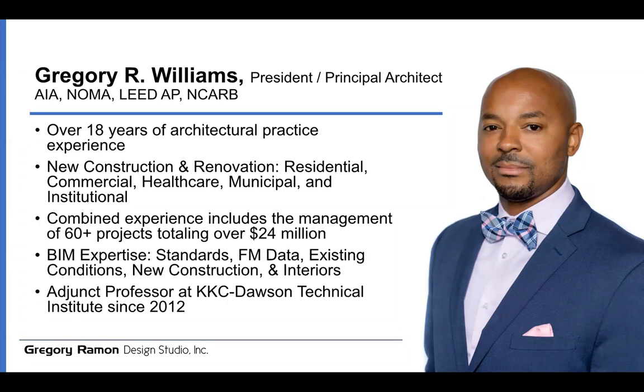If you're not in Chicago, I would just check the website of the village or other jurisdiction, because everyone will tell you typically when a permit is needed or when drawings are needed for a particular project. And just in general, it's when you're configuring or changing a space and you're potentially affecting the health, safety, and life safety of occupants in the building. Because if you go in and redo plumbing and the waste and the supply somehow get cross-contaminated or mixed, that's an issue. So anything that the city needs to come out and observe and inspect prior to it being closed up is typically when you're going to need to have a set of drawings to go along with that.